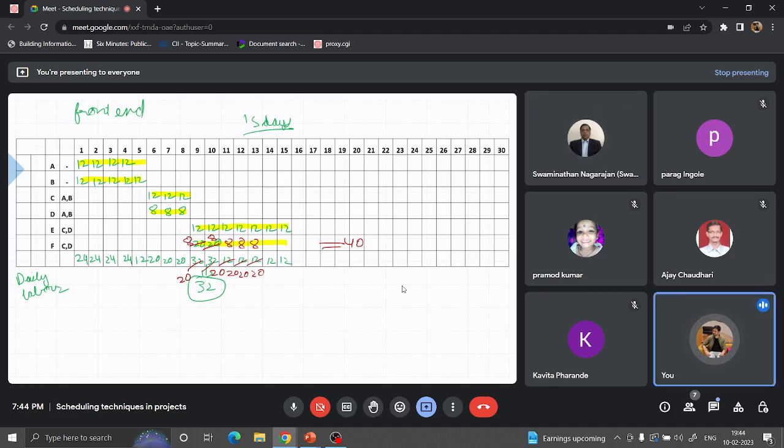As sir talked about in LOB also, it might happen that we have people who can work on almost every activity. If we are talking about laborers, we can move them around with masons also, or welder crews also. If they are just picking up and placing, we can use the crew around. So it's better to have them leveled. I mean, you don't have varying labor requirement.